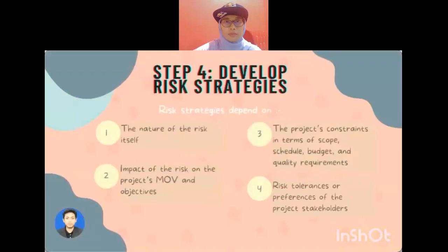Step 4. Develop risk strategies. The purpose of risk analysis and assessment is to determine what opportunities and threats should be addressed. It is not feasible or advisable to respond to each and every threat or opportunity identified, because avoiding all threats or chasing after every opportunity requires resources to be diverted from the real project work.